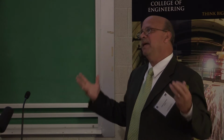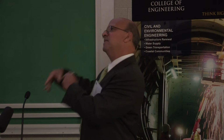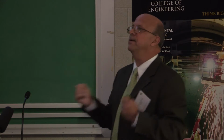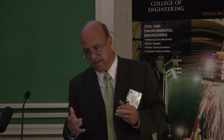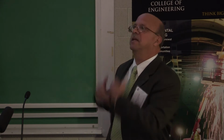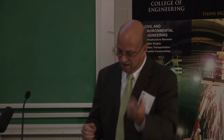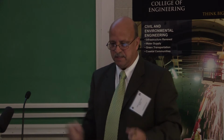And basically we said, we have guys in the field, we have our materials here, let's take as many tests as we can, and let's just start comparing data. Because at first, the only thing we had to compare was acceptance. And again, there's a lot more QC testing than there is acceptance testing. So we just started taking a bunch of extra tests, just for verification purposes. And I give my guys so much credit in the field, because through these tests, they started compiling and using control charts on their own. It was just something we started doing.